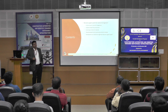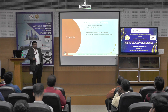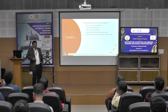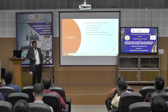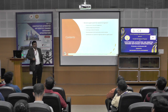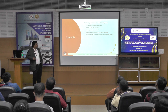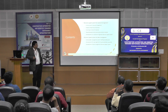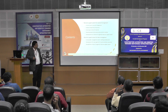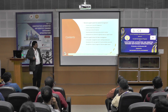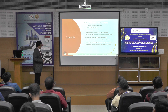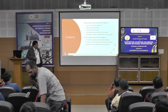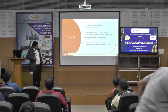Ultimately, the DSS will produce, based on the construction schedule, an optimum material procurement schedule. This will help construction practitioners know when materials are to be purchased, how much quantity should be purchased, while minimizing cost and considering other important parameters. The next research we conducted was on labor management, where we developed a decision support system for labor management.